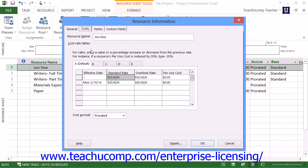On the Costs tab, you can set detailed costing information that you cannot set by simply using the cells available in the resource sheet view. You can also specify different rates based on different dates by entering the date that the new rates are to take effect into the Effective Date column, and then entering the new rates as of that date into the columns to the right.